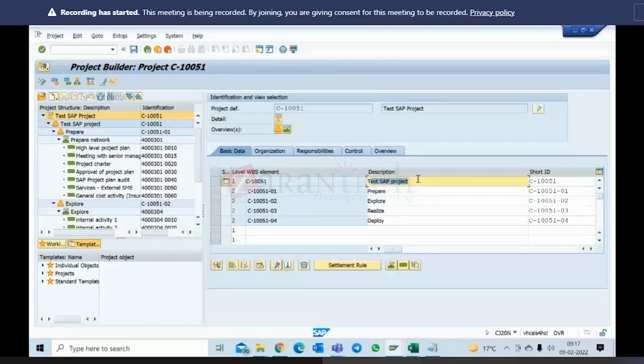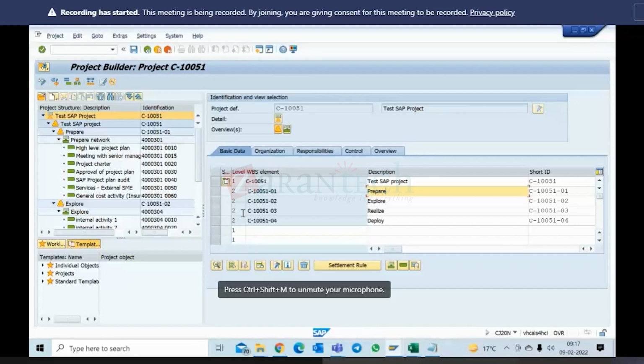Let's say I'm taking a hospital project. So I can have maybe first buildings, building A, B, C. Then within buildings, I can have departments, or directly I can have departments. Then within departments, maybe I can have OPD, how much, hospitalization, how much, then maybe wards I can have. That sub level of WBS I can have like that. Like this, then we have to come out how we can do the structuring.